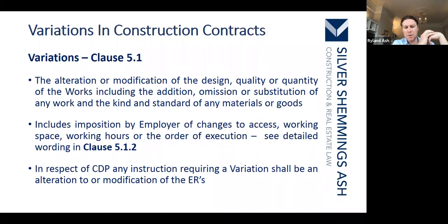In respect of the contractor's design portion, any instruction requiring variation shall be an alteration or modification to the employer's requirements. So that goes back to my point about design. There needs to be a change to the ERs, really, for there to be a variation.